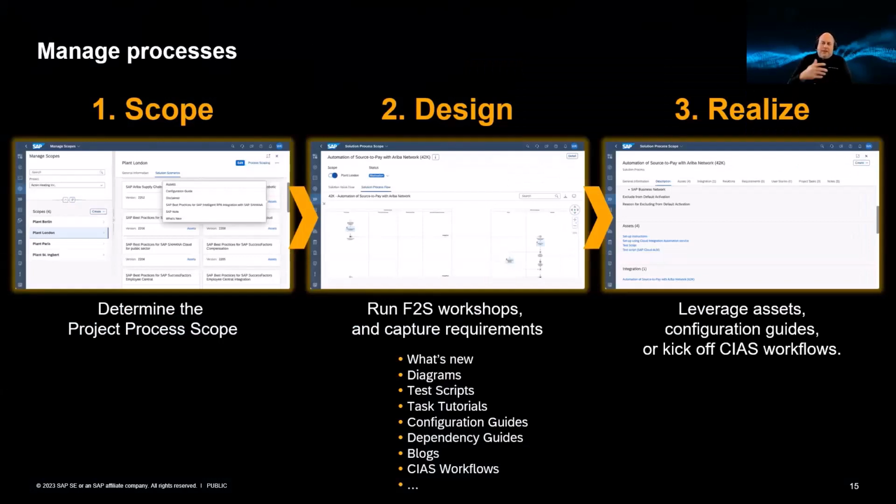So when we're doing this implementation of our cloud solutions, again, we're going to be starting out with scoping. We're going to see exactly what we're going to be implementing in this project, what products, what solutions. We're going to be bringing that into the design phase where we run our fit to standard workshops and capture the requirements, based off diagrams, configuration guides, blogs and workflows.